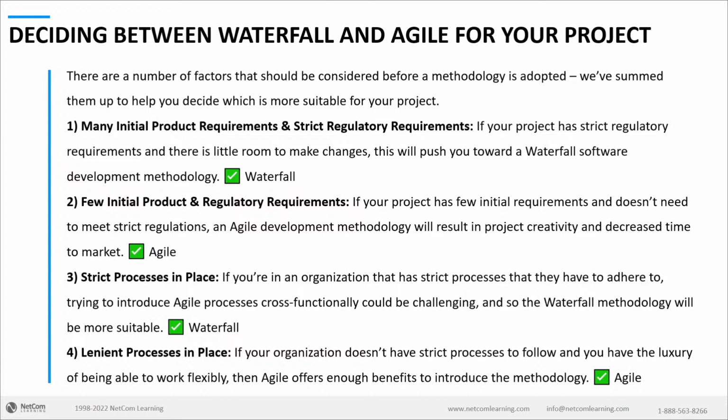Many initial product requirements and strict regulatory requirements, if this is what you see in your project, it's better you move to the waterfall approach. Few initial product and regulatory requirements, you don't have a lot of such restrictions, and the inputs about the features in the very beginning are not that detailed, you'd better use the agile approach.